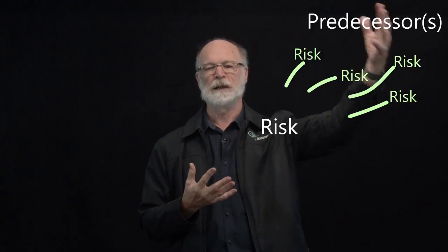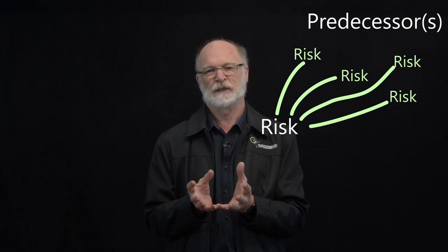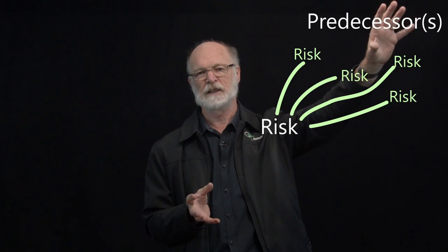You do not work just doing one job. You have a range of jobs that you need to do to keep your staff happy, to keep your clients happy, and everybody else happy. So if you've identified a risk, look also for predecessors. What needs to happen before you get to that activity, and by putting this extra security on there, is that going to have an impact leading up to it?